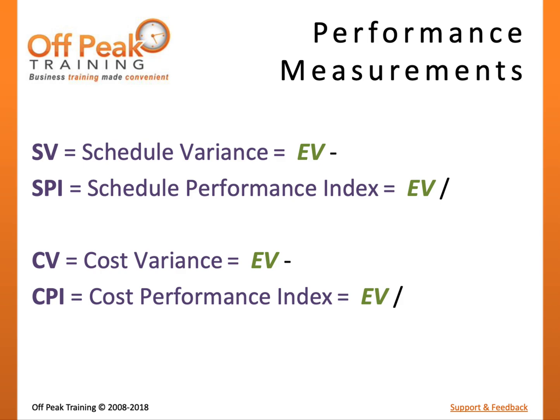Step three is to use the proper comparative value. To understand schedule performance, we compare what we earned against what we should have earned, or Planned Value. Schedule Variance measures the difference between work completed and work planned; SPI measures the ratio of work completed to work planned. To understand cost performance, we compare what we earned against what we spent, or Actual Costs. Cost Variance measures the difference between the value of work completed and actual costs; CPI measures the ratio of work completed to actual costs.